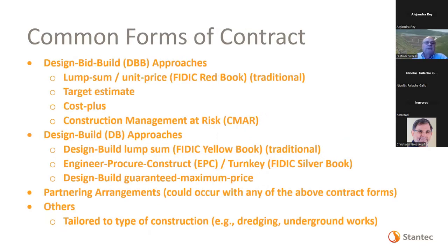Okay, common forms of contract. From my prior procurement presentation, I identified these. There's the design, bid, build approach, which is the traditional approach frequently used on large civil works projects. It uses the FIDIC Red Book, which I'll get into in more detail. But I also list other ways that we sometimes implement design, bid, build projects.